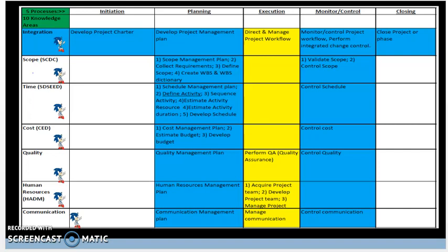Similar to other steps in scope planning, creating the WBS and WBS dictionary is a critical element of the project and must be very thorough with clear understanding from the business and IT sides of the house. Once the scope is decomposed using a WBS and stakeholders approve it along with the scope statement and WBS dictionary, this becomes the scope baseline. Recall that the baseline is an approved version that cannot be altered without massive change requests.